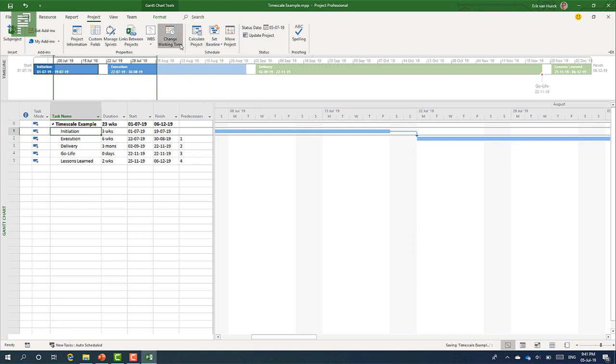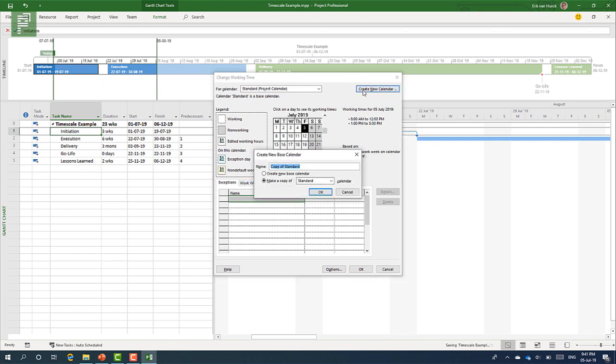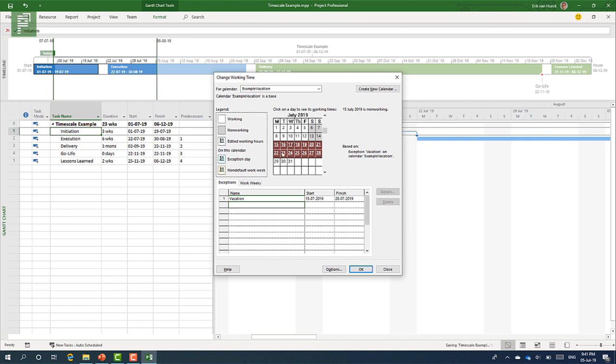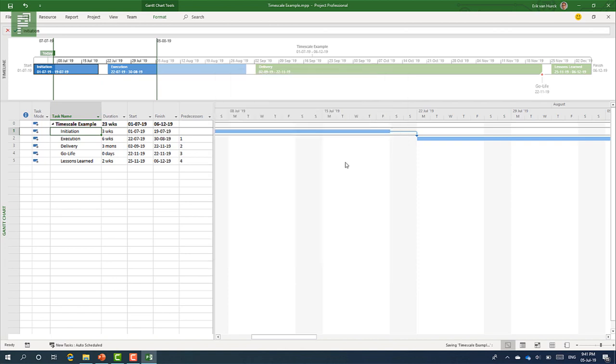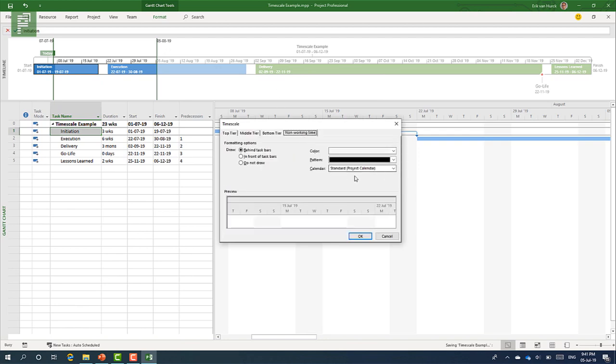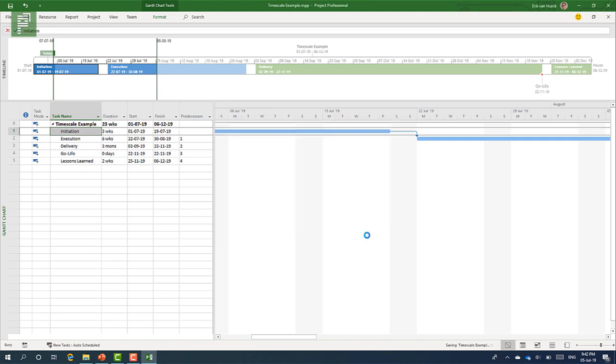And, I will show you what happens with the time scale. So, I'll head on over to the change working time. And, I'll create a new calendar. Example vacation. Make a copy of the standard. Yes, that would be fine. And, I'll select these values here. And, I would say vacation boom. So, these are now exceptions and I'm not going to work on those exceptions. But, currently, what is shown here is the time scale and the non-working time for the standard calendar.